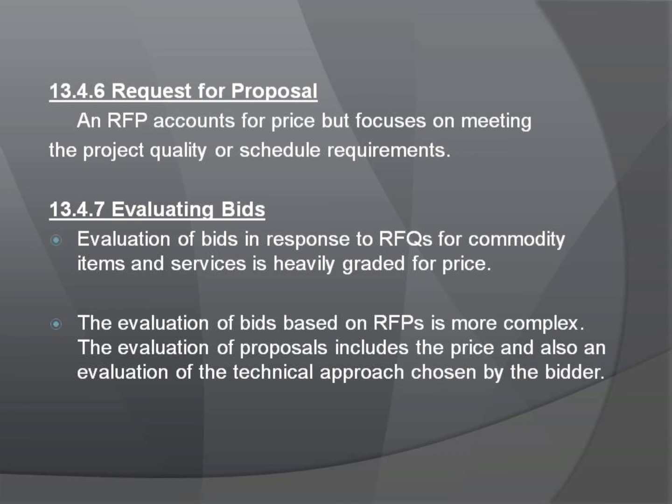On more complex projects, the administrative part of the proposal is evaluated and scored by one team, and the technical aspect of the proposal is evaluated by another team. The project team combines the two scores to determine the best proposal for the project.